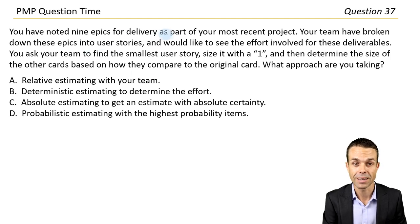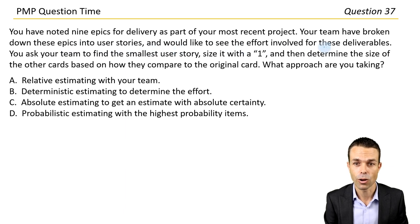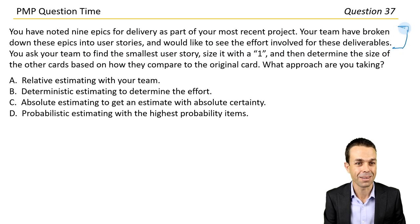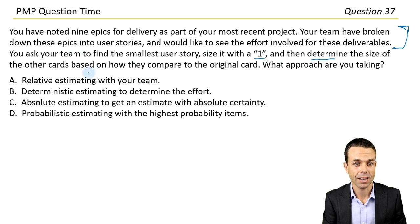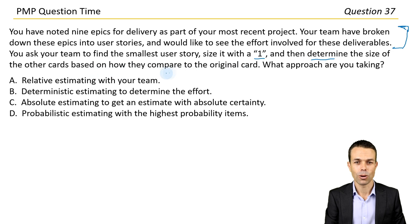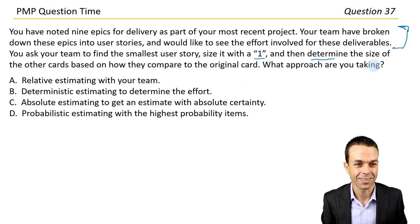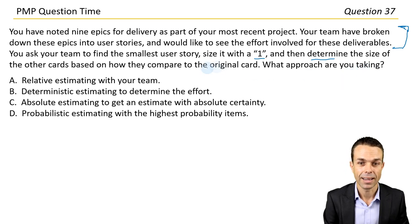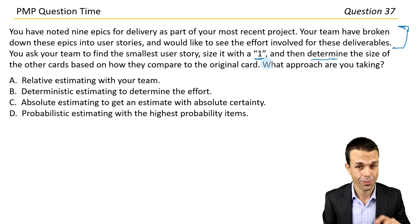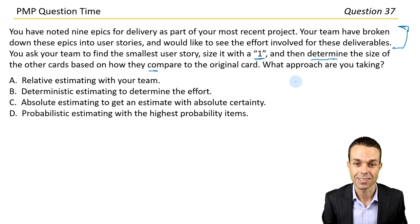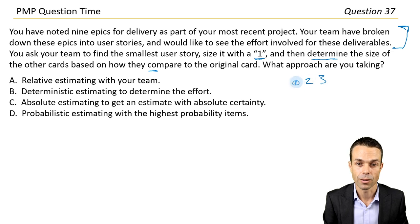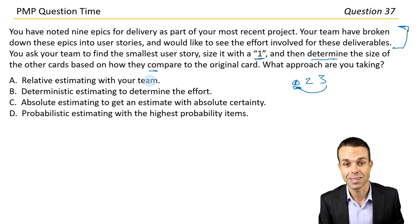You've noted nine epics for delivery as part of your most recent project. Your team have broken down these epics into user stories and would like to see the effort involved for these deliverables. You ask your team to find the smallest user story, size it with a one, and then determine the size of the other cards based on how they compare to the original card. What approach are you taking? We've got one as our baseline — the next one might be a two, the next a three based on how big it is relative to that first one. That's relative estimating with your team — answer A.